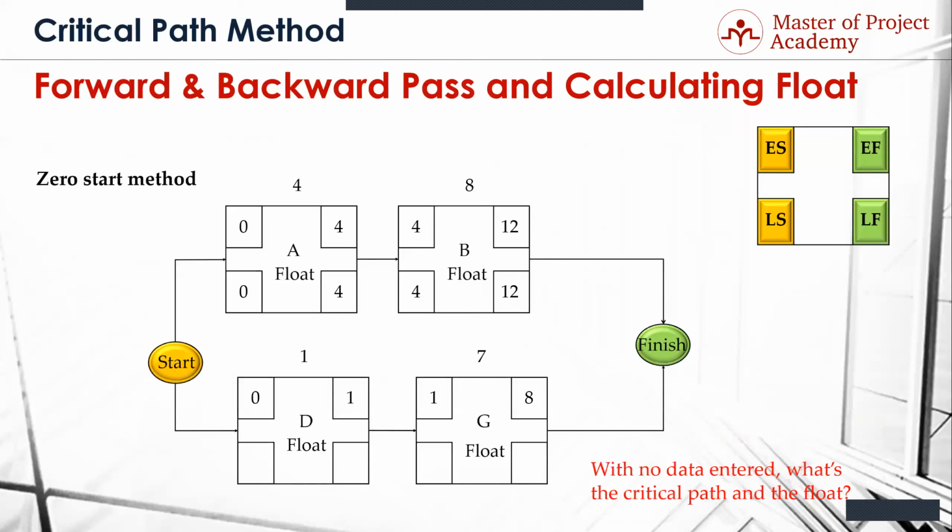All right, now, so that's the easy part because that's on the critical path. Here's the one that's very important to get right. So if this is the longest duration we can do on this project, we can't go over 12 days because that's our critical path. Whatever this number is, this 12 here for your late finish, it is also going to be the late finish for every other path in your network. So guess what number goes here? 12. And now you can't just match the numbers because we have some float.